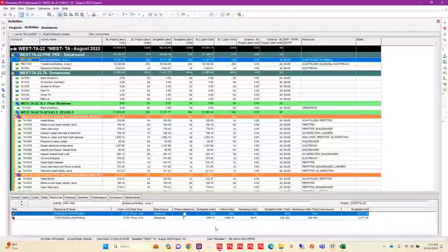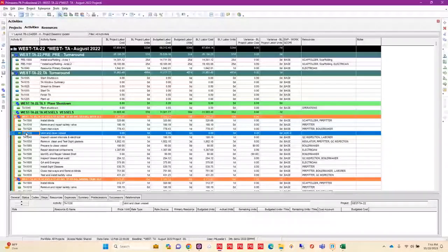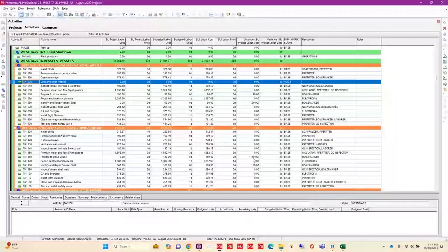Go back to P6 and refresh my data. And I can see I have my found work here that was added. And I've got my debit and my credits going between my four activities. So now I can see that there is a difference there. So a really easy way to update your baselines, work with your baselines, a lot less cumbersome than the functionality in P6 that is provided, as well as a lot easier than detaching that project baseline, updating it, and then reattaching it.